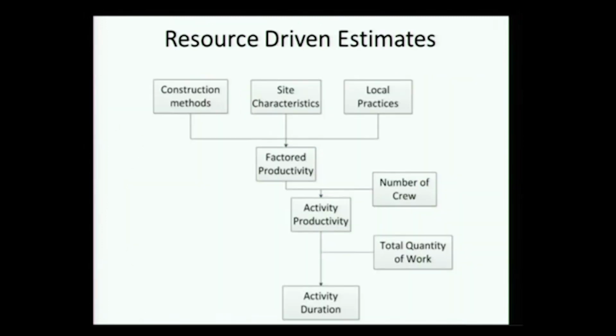I can go the other way around, which we call resource driven. That is, my methods, all of this is fixed, only my duration should change. I cannot mobilize more crew. This is what I have, and a lot of companies face this issue. They say, this is what I can mobilize, how long will it take me to do the job or to do the activity?